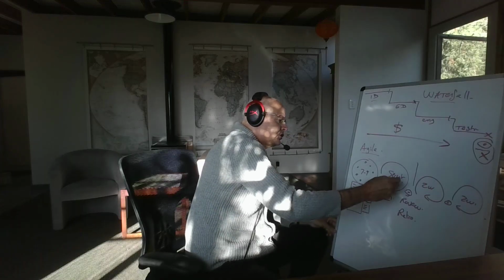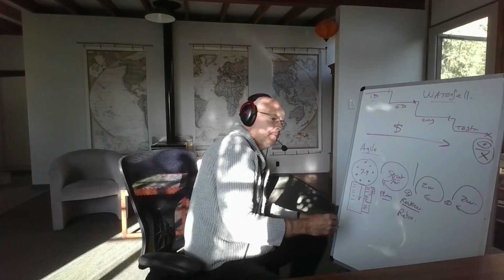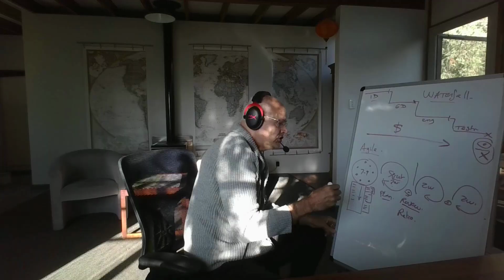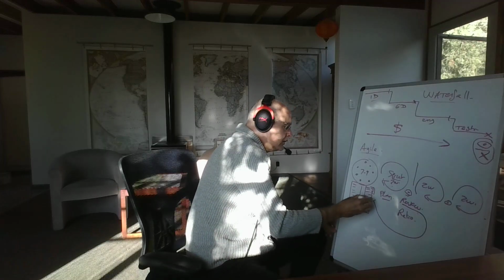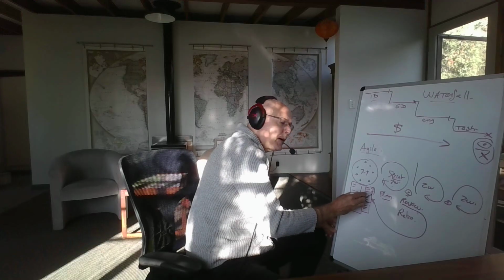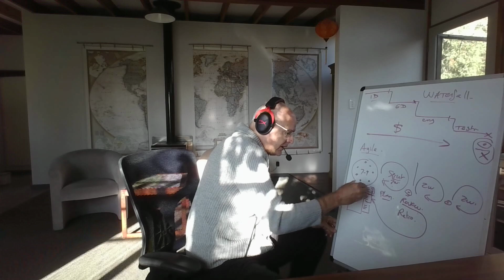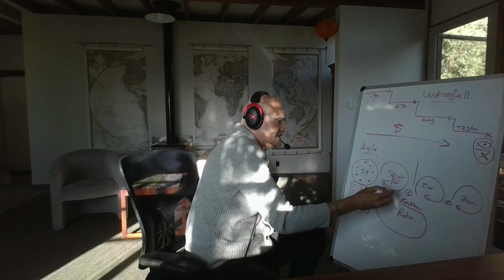At the end of that journey, we then take a look together as a team, and it's called a sprint review. We take some notes on what we like, what we don't like, what we'd like to change, and some of those notes will go into our backlog, and some of them are going to trump what we thought was going to be next. Now, this goes down in favor of improvements on what we saw in the sprint review. So that's the whole idea.